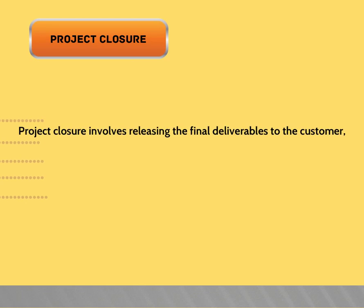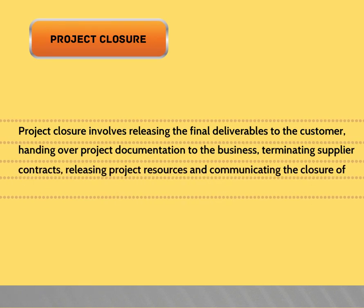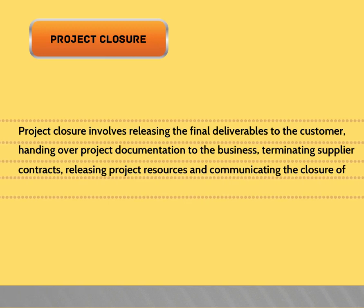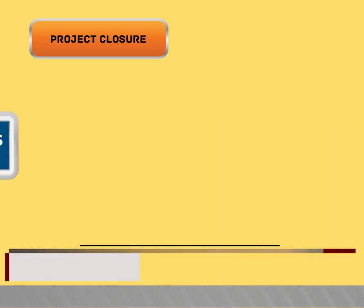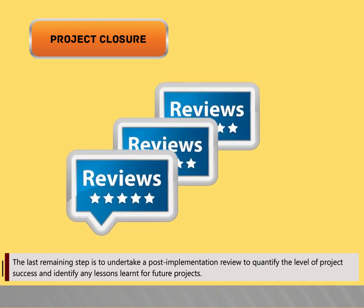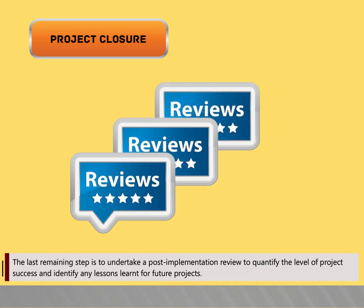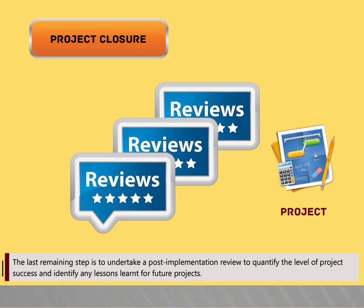Project closure involves releasing the final deliverables to the customer, handing over project documentation to the business, terminating supplier contracts, releasing project resources, and communicating the closure of the project to all stakeholders. The last remaining step is to undertake a post-implementation review to quantify the level of project success and identify any lessons learned for future projects.